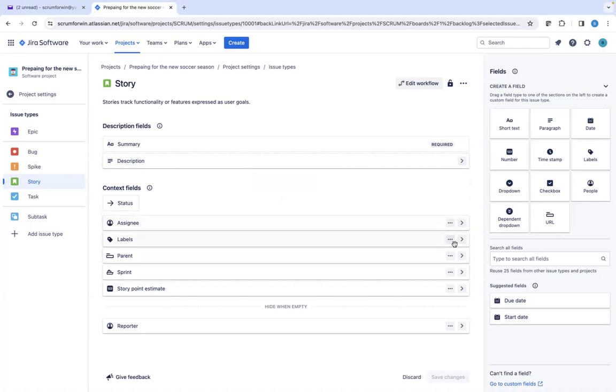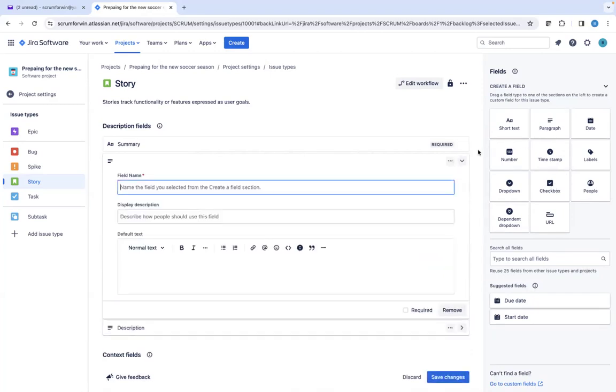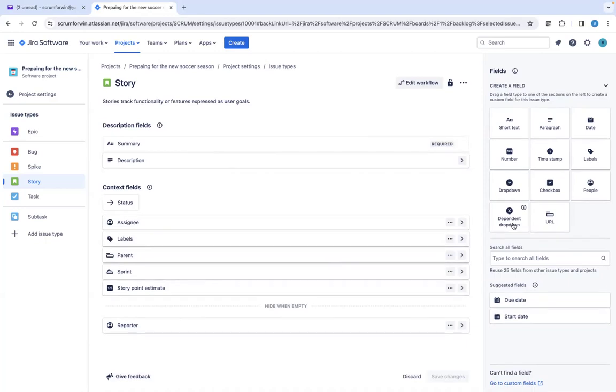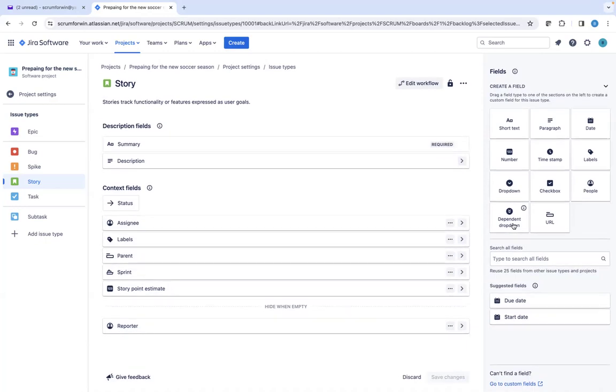And then we just add, typically I just add like a line or two. My team adds a line or two, and then we'll just start writing out our acceptance criteria. In this situation, it sounds like we should use the bullet points as opposed to using the given-when-then format, since there are several different things that we have to ensure are done before we can accept this story as complete.